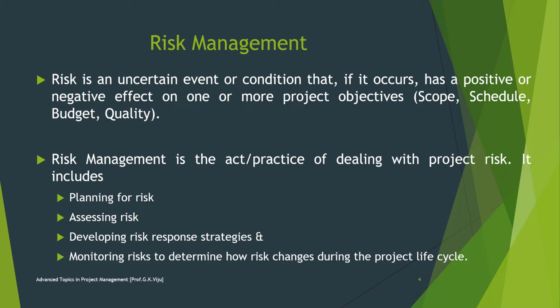If your project requires that you stand on the edge of a cliff, then there is a risk that you could fall. If it's very windy out or if the ground is slippery and uneven, then falling is most likely. When you are planning your project, risks are still uncertain. They haven't happened yet, but eventually some of the risks that you plan for do happen, and that's when you have to deal with them. There are four basic ways to handle the risk: avoid the risk, mitigate the risk, transfer the risk, and accept the risk.